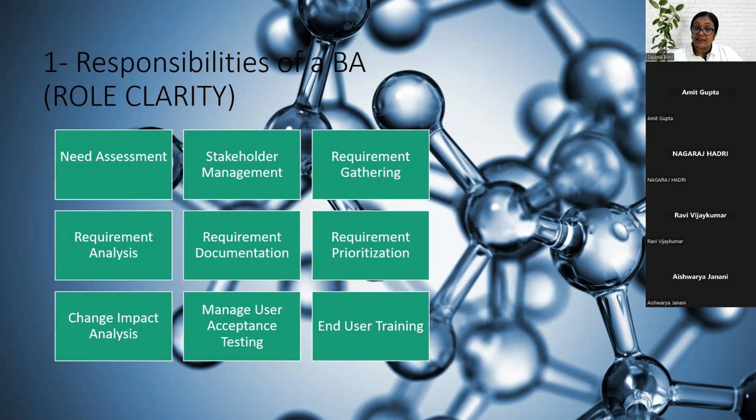Most of our customers, guys, they are of the habit of making changes. They give us the requirements and then change it again, and then change it again. This frequently happens in IT projects. And when those changes are requested by the customer, we need to, as BAs, do an impact assessment to understand what is the level of impact of the change on the functional modules, how the change is going to impact the existing working modules. That is impact assessment.